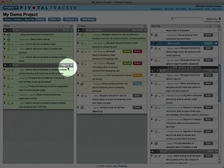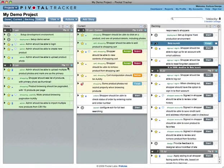At the end of an iteration, accepted stories are promoted out of the backlog, and your remaining iterations are refilled according to your updated velocity.